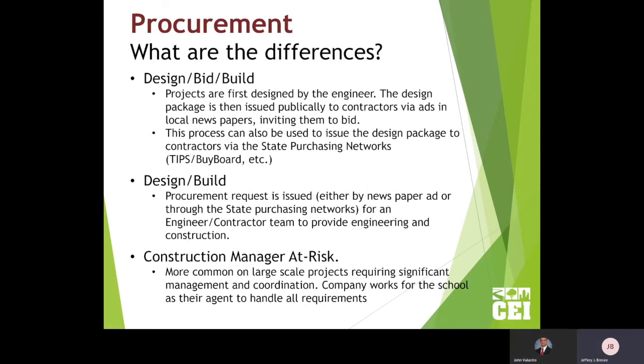Design build is different. It's usually meant to save a little bit of time and build some efficiency. It's best used when you have a high level of trust with the contractor and with the engineer, because in doing so, you're basically saying we want you to advertise publicly, but instead of putting the design together first, you're kind of choosing who the contractor and who the engineer will be just on the more description of the project. And then once they're on board, then the design begins. And then that engineer is to work with you and the contractor to get the construction drawings done.